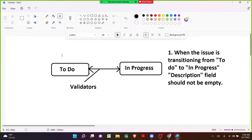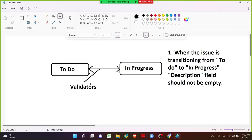On a particular workflow, once the issue has been created and assigned to someone, they will start to work. When the assignee or anyone on that ticket clicks on the In Progress status button, Jira should validate the description field. If the description field is completely empty, an error message will pop up stating that you must fill the description field, so that the user will fill it. It's not just the description — it might be any custom field.